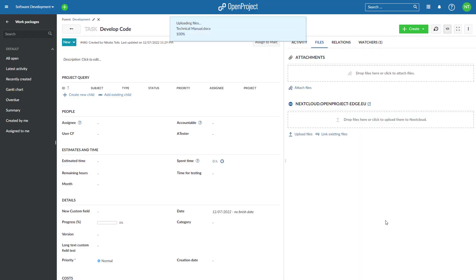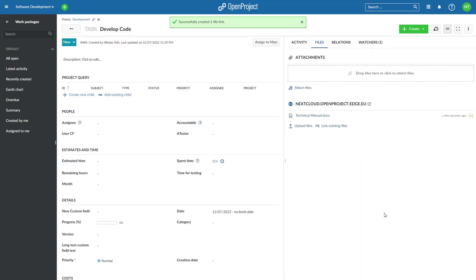You will also be able to set up project templates with a project folder in OpenProject containing a predefined folder structure or file templates already linked to certain work packages. Copying a project or project template will set up a new project folder based on the existing structure and files, and even copy and update the file links from work packages for the new project.